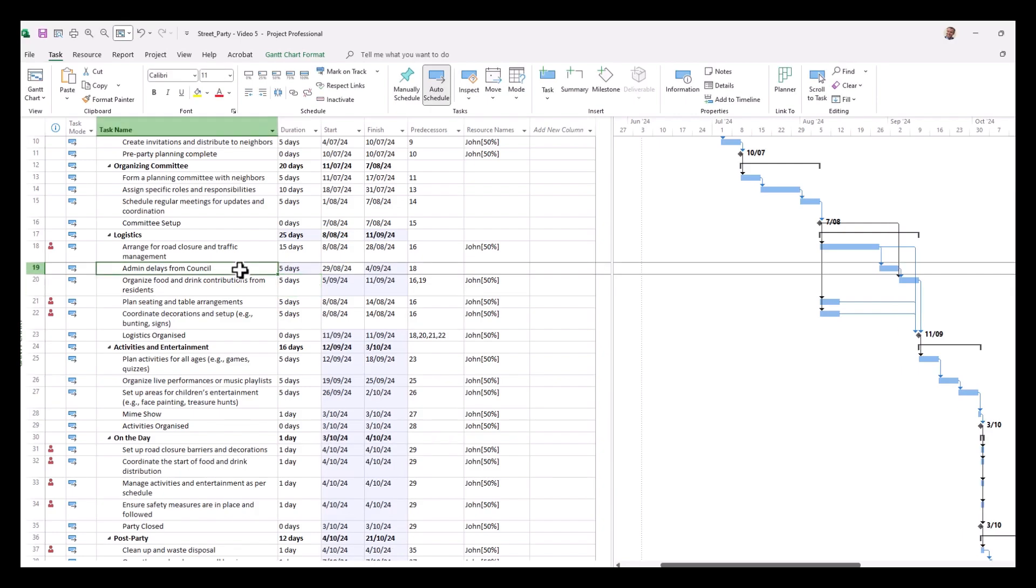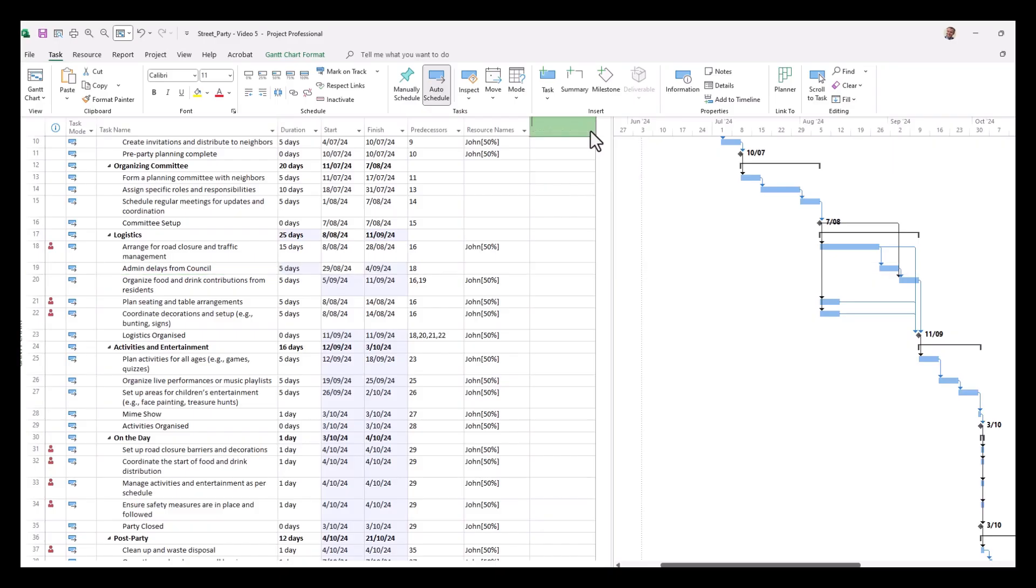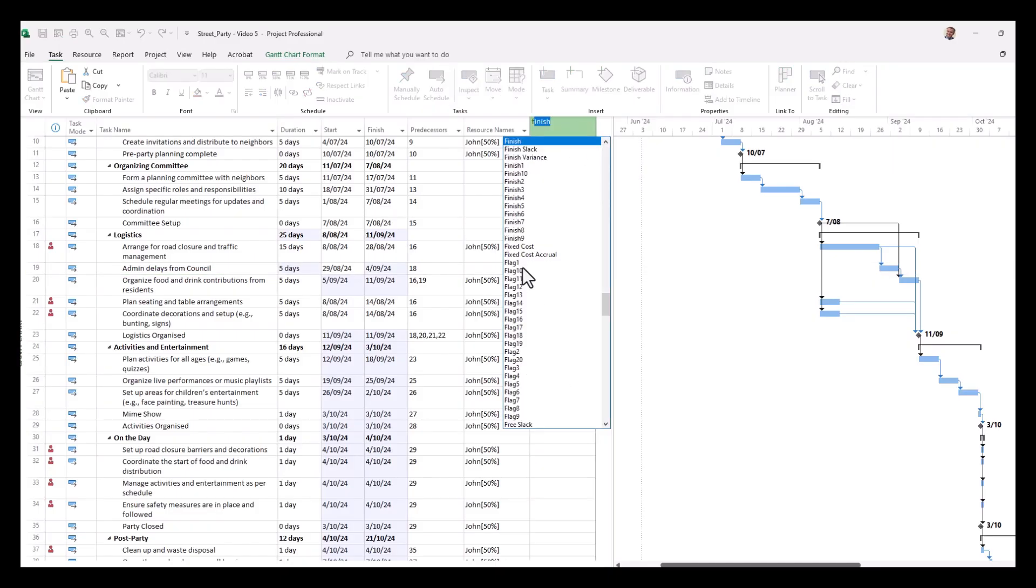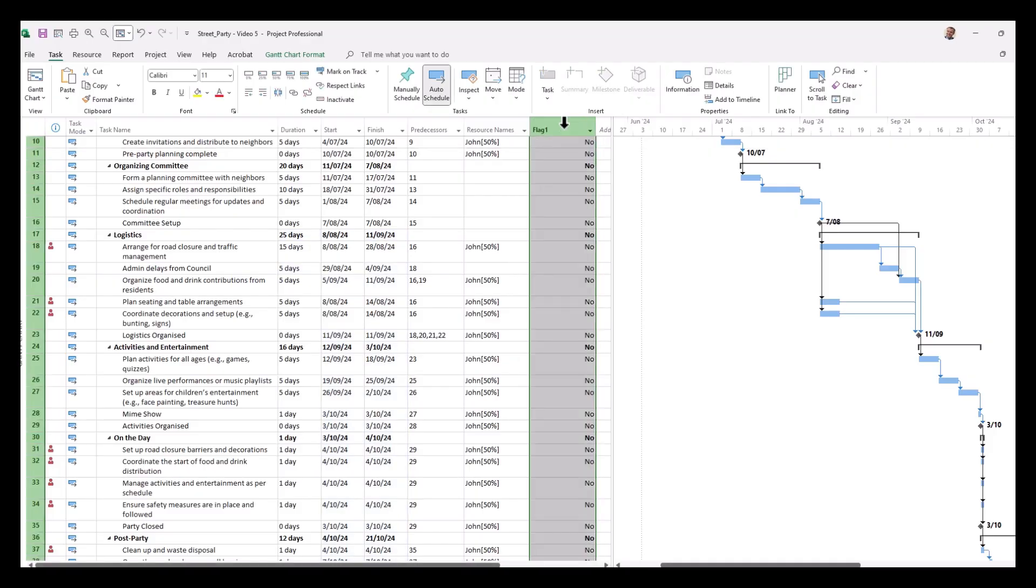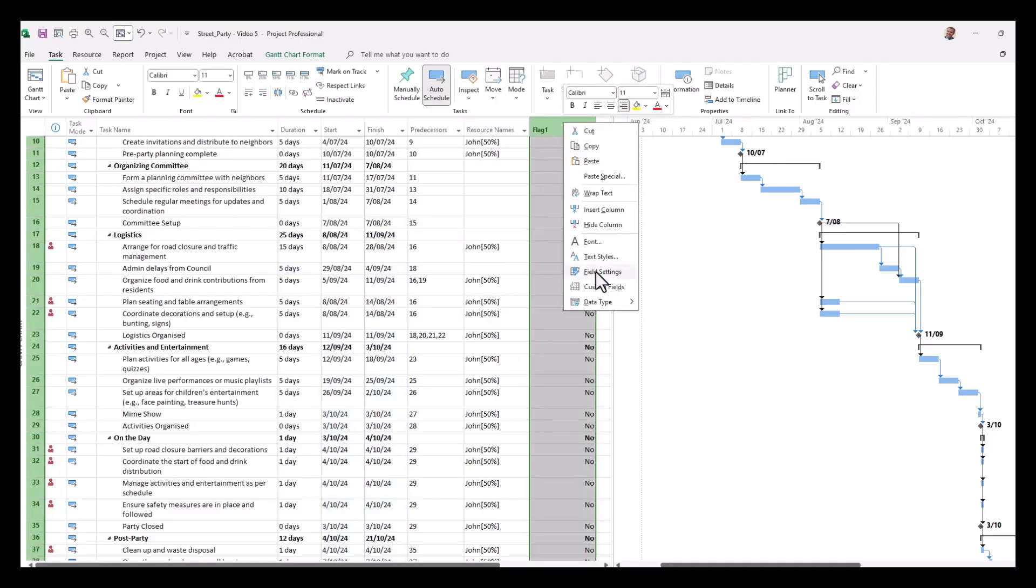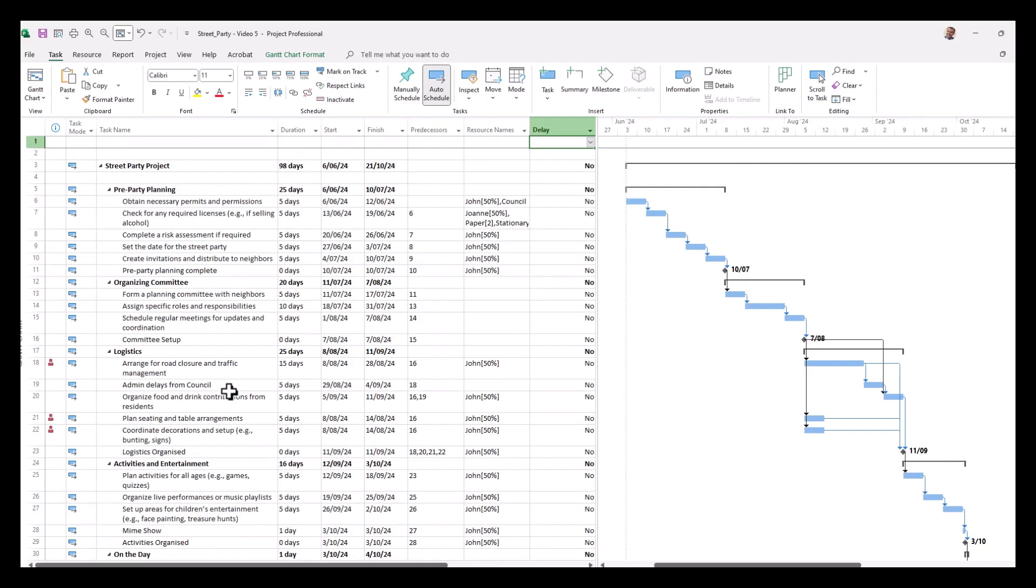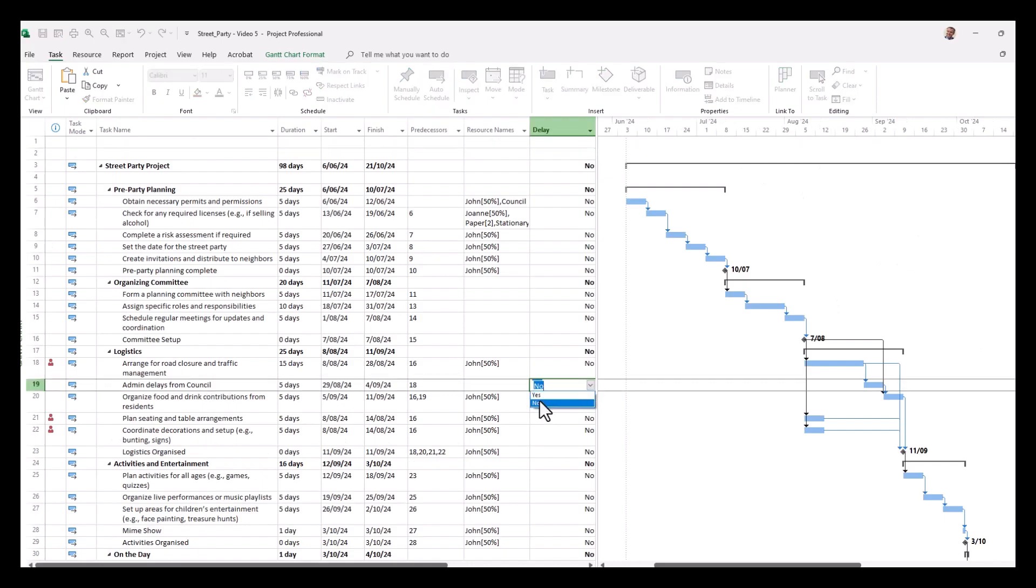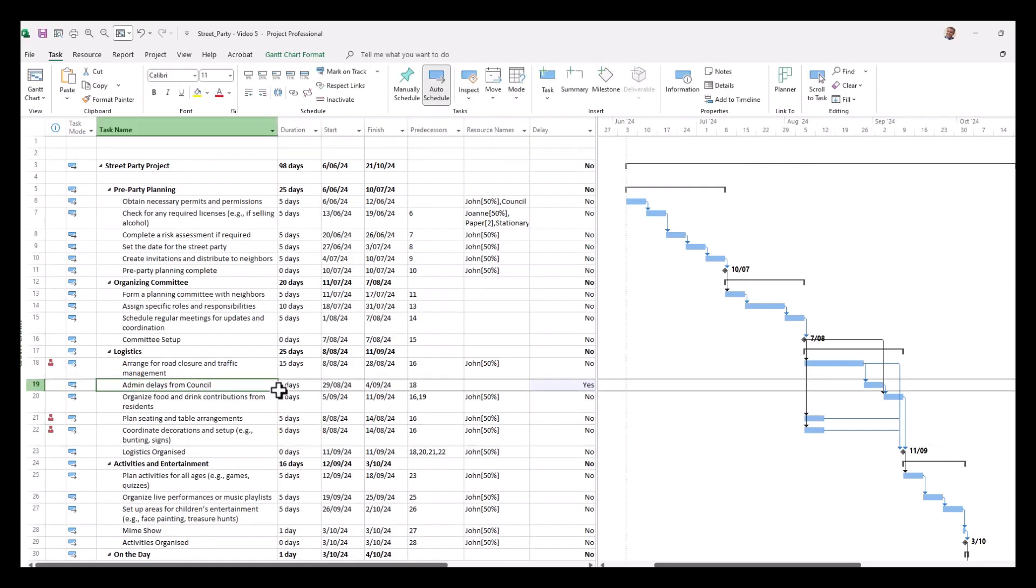Now it'd be good wouldn't it if we could make this stand out, particularly our bar step. How can we do that? Well we can assign a flag to show delays. So we're going to select, for this example, flag one and we're going to rename that delay. Do this by right clicking on the column and selecting field settings and we'll call the title of it delay. Now we give this a tick of yes to show that it's a delay. Now this differentiates the delay from the other tasks.